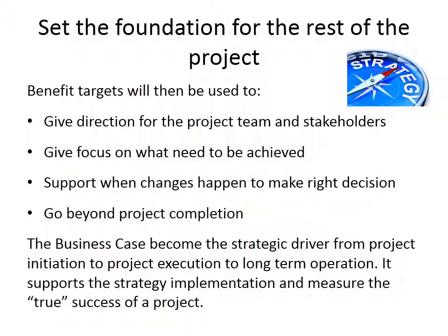It will also allow the project manager, for example, the business analyst, to pay particular attention to elements that will deliver value to the project. So it will give focus. As I said, if you implement an ERP system and your focus is on real stock value, you might spend quite a detailed amount of time making sure that you get all the configuration around your stock management really pertinent to what the organization wants to achieve. So again, not only does it help understand what we want to achieve at the end of the project, but it focuses your actions throughout the project on the key elements that need to be implemented to achieve the value at the end.